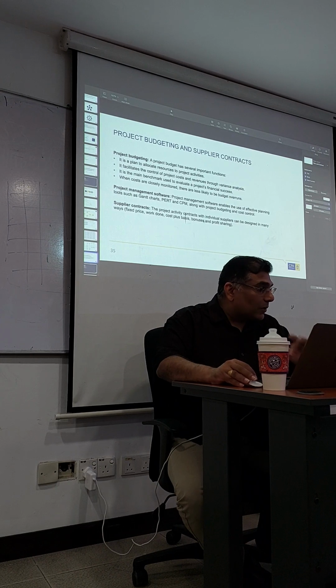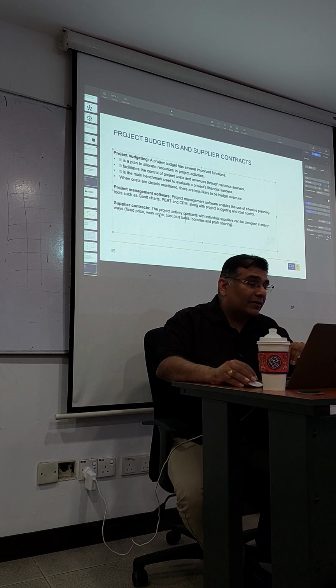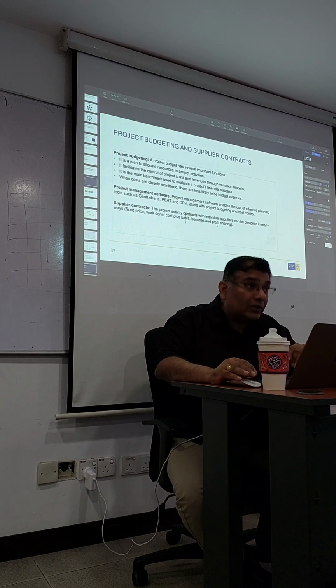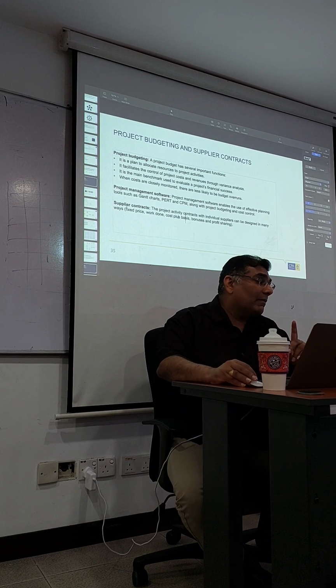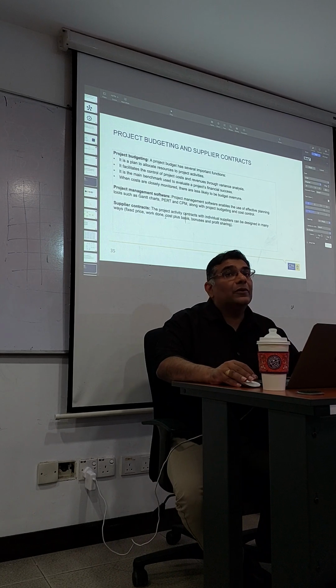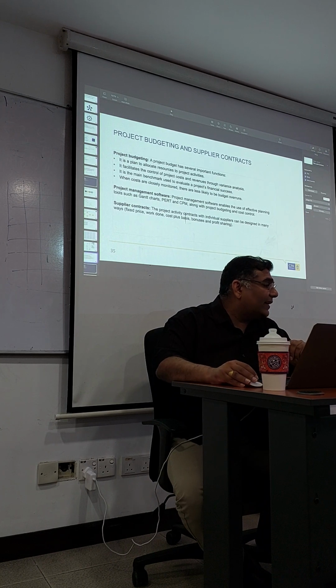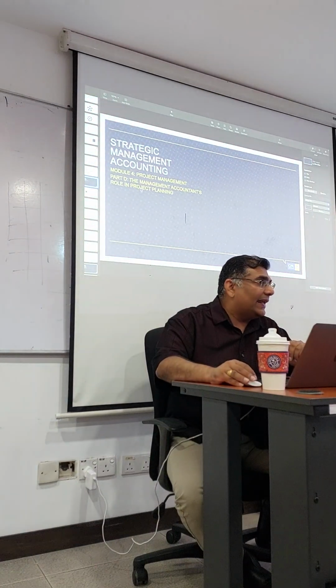Supplier contracts for project activities with individual suppliers can be designed in many ways. You can have fixed price contract, work done pricing, cost plus basis. You can give bonuses or even profit sharing. These are all the different types of contract you can award. Remember, fixed price means you lock the price. Work done is how much work you do, you charge me. Cost plus is whatever cost you incur, you add a certain amount and charge me. Or you pay a bonus or profit sharing if the project has a profit element. Are you clear? Okay, that covers this module D.